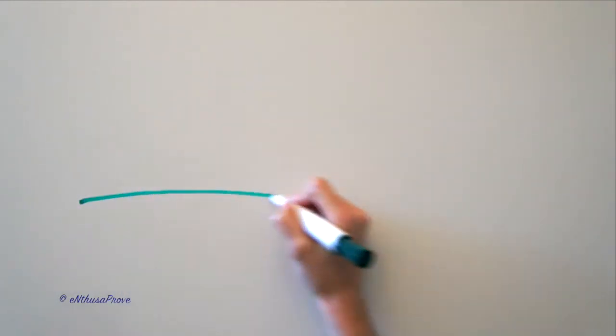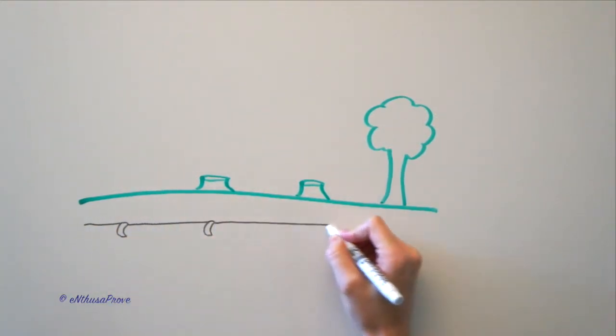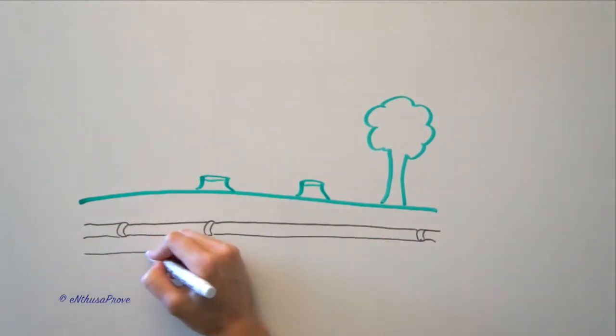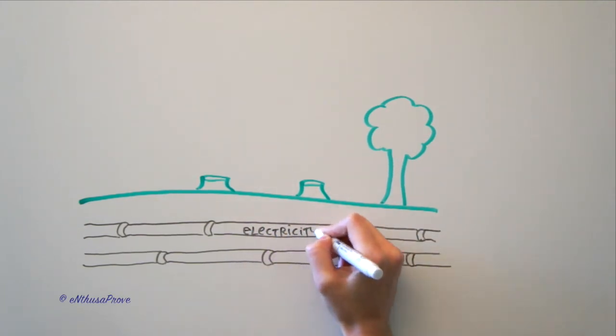If we're working on a project to build a house, the first phase is to clear and prepare the land. So let's think about what could go wrong in clearing that land. You come out to see how the work is going, and there's a tree still standing that was supposed to be removed, and the contractor's nowhere to be found. This is going to cause extra work on your project to get the contractor back out there to remove the tree, and it might delay your schedule because you can't do the things you had planned to do with that tree there. The extra work and the schedule delay are consequences. But what's the likelihood of this happening? Is it a slippery shower or a monster under the bed?